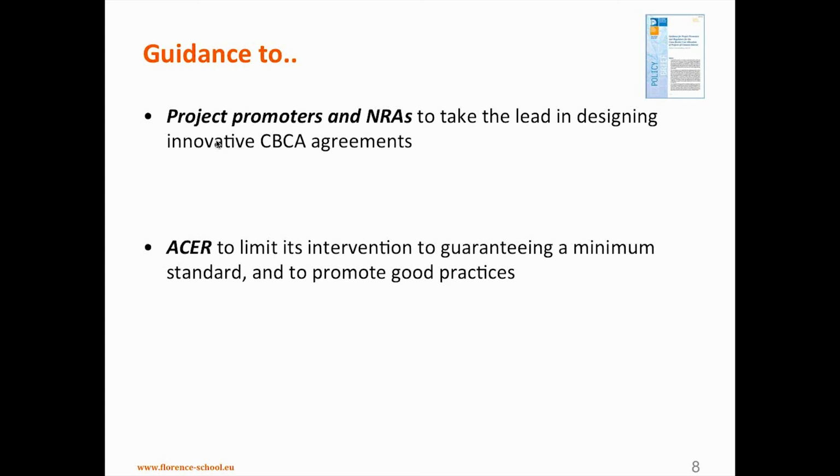What we should do rather is to encourage this type of innovation. That's why we also say to Acer, because as you might know, the whole process of cross-border cost allocation is that project promoters, when the project is mature, go to NRAs. NRAs then have to decide if they agree or not. And if they cannot agree among countries how to split the costs, within 6 months, the decision goes to Acer. That's why we also had to give guidance to Acer what to do in that case.